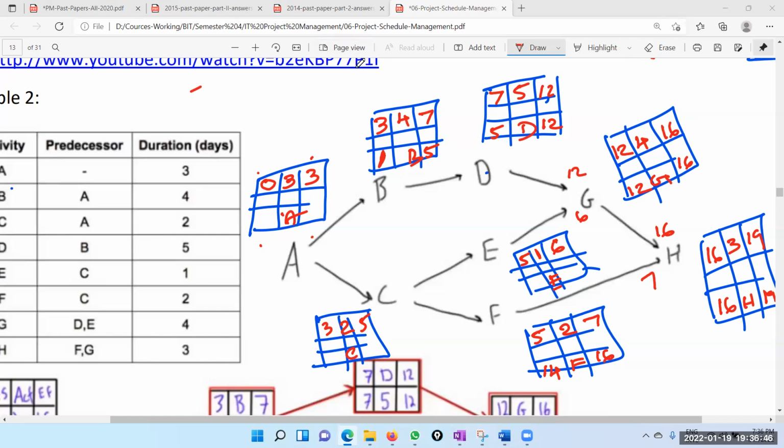Right, sorry for that. So let's see where it went wrong. 12 minus 5 is 7, because this is the duration. So therefore this is 7, and 7 minus 4 is 3. And when this is 3, this is 3. Okay. And now we have two options. So you have to just wait. We can't take this one as 3.